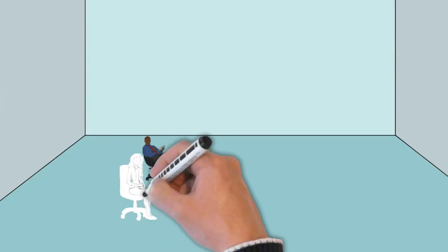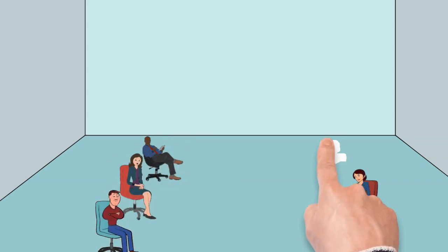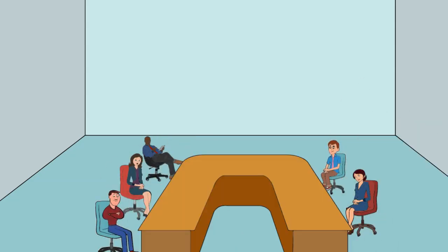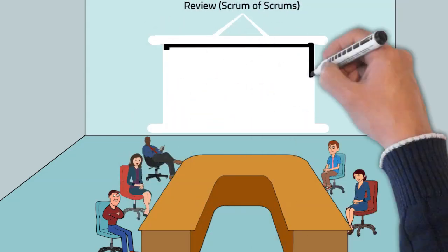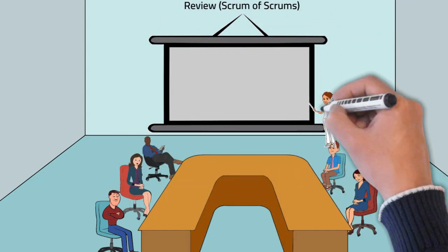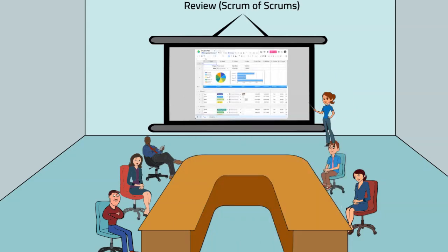After a few hours of each squad having time to individually create their plans, and before day one concludes, we will have what's called a scrum of scrums, where individual squad representatives will join the meeting, where they will actually present their draft plan as it stands so far. They'll also have the opportunity to discuss any dependencies, any risks, or any other information that they need to discuss with the other squads so that they can go into day two effectively ensuring that they have an adequate plan going forwards.